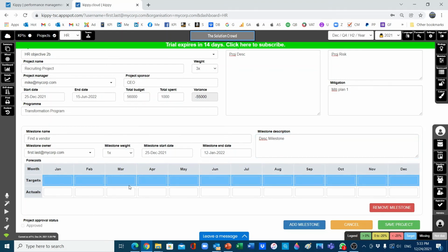Very important to add the progression or the progress of this milestone. It's a cumulative progress. So 5% and 10%, 15%. No need to add a symbol at all here. We just need to add a number so the formula could work. So then 25% and 50, and then we'll finish in June at 100%. Let's say we already started and we are way ahead of the schedule, and we have a 20 so far progress on the specific milestone.